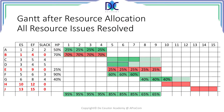We now see that the project has a good resource utilization. This will be our planned start Gantt chart, but first I have to calculate the early start Gantt chart. We take away the resource information, replace it with the cost of the activities, and now you have to fill out this table to calculate the time-phased cost and the cumulative cost. Do it on the documents supplied or that you made yourself.